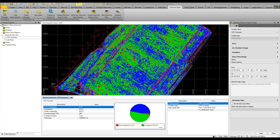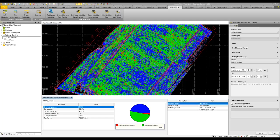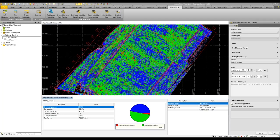These calculate the volume of material that's currently being laid and over how long that has taken to happen. Also very useful for calculating progress volumes day-to-day or week-to-week to maintain cash flow, because you do have a record that you've actually achieved some work on a job site.